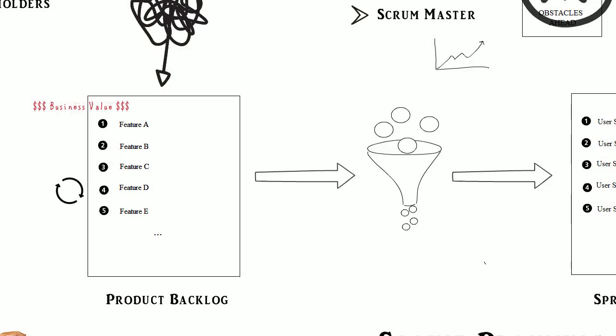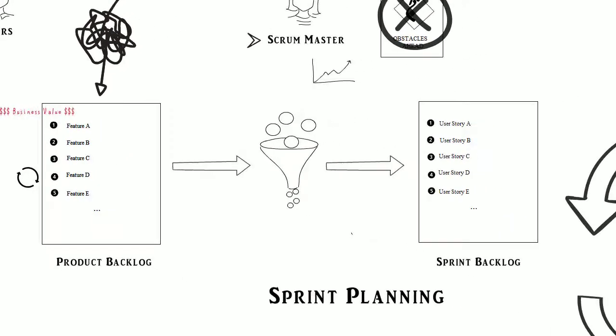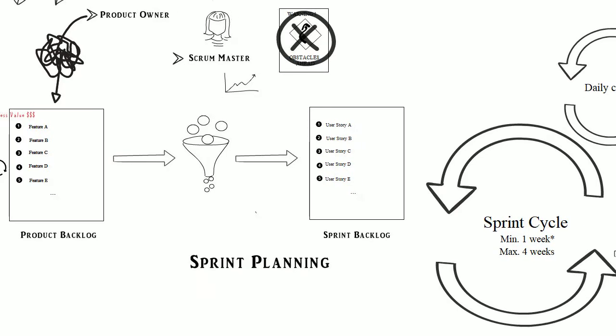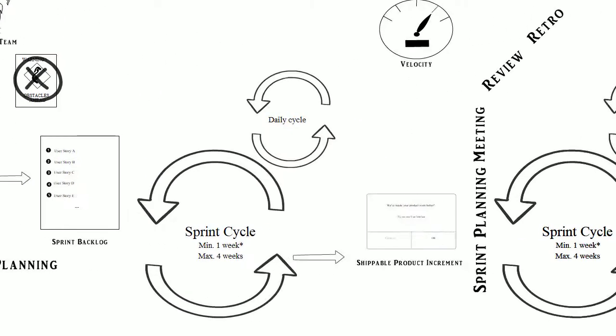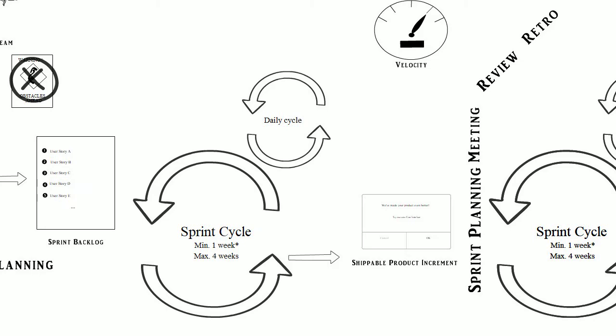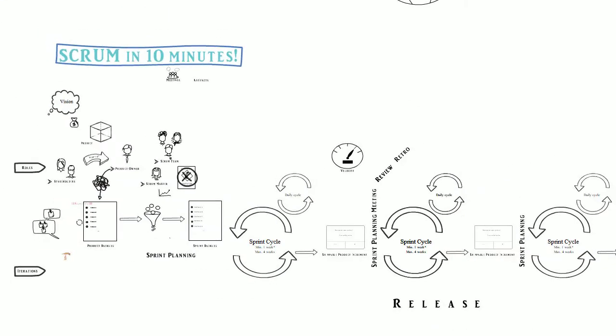With the sprint planning behind them, the team can now start the sprint. Then, once a user story owner finishes the work for the user story, he reviews the work with the product owner, who then validates that the acceptance criteria have indeed been met, and the product owner accepts the story as completed. At the end of the sprint, the team reflects back to determine what they can do better in future sprints. Any requirements that come out of the retro meeting also go into the product backlog and are prioritized by the product owner.